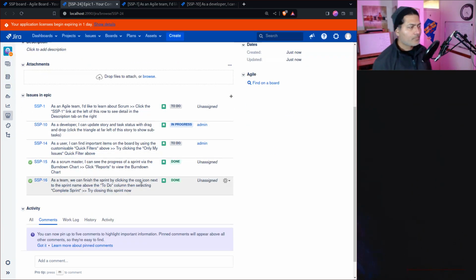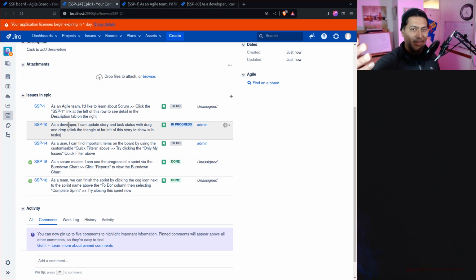Like, let us say a listener. I think listener is probably better in this case, or maybe I should say job, because a job you can run occasionally. Usually people want to do it immediately, so that whenever there are, let us say, 10 stories, and people are updating these numbers, you want to display a total, or you basically want to update the epic. And it can be a problem, because imagine you have hundreds of epics, and those hundreds of epics will have thousands of stories. Whenever each and every story or some of those stories are updated, you want to make sure the total is updated at the epic, and it can of course cause performance issues.